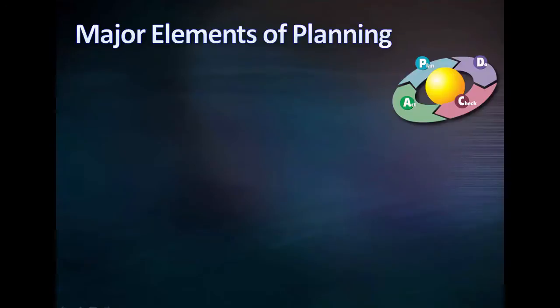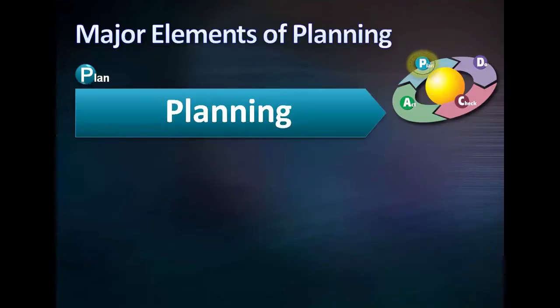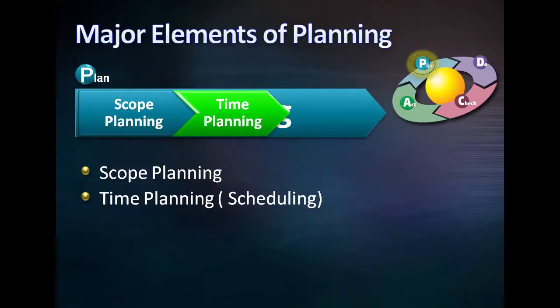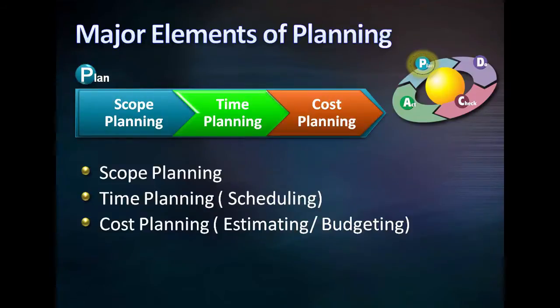Scope planning is part of the planning stage in the PDCA cycle. The planning stage is composed of three modules: scope planning, time planning, and cost planning.